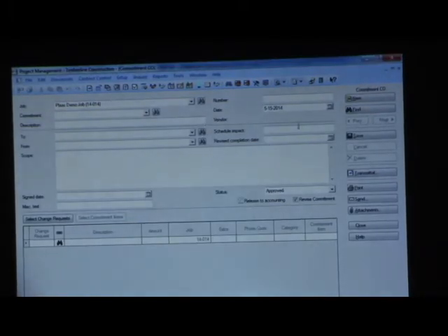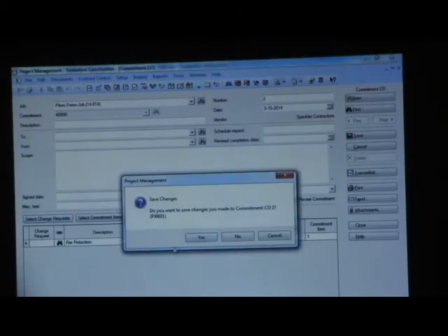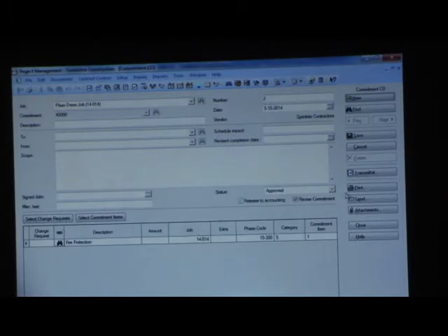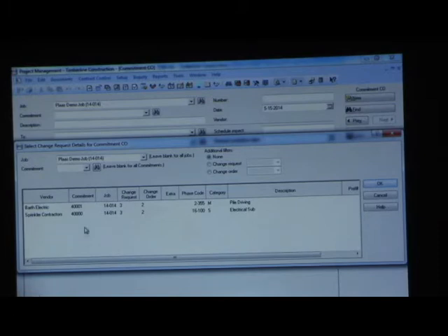And then again, the third piece is the commitment change order. So you can either pick a sub and then say, are there any sub or purchase order? And then say, are there any line items pending for that sub? Or when you first come into the screen and it's still blank, you can say, show me all the line items that are out there so I can see if I owe anybody a change order.